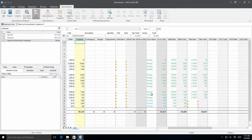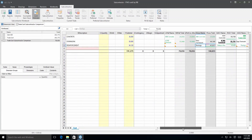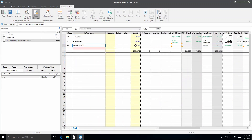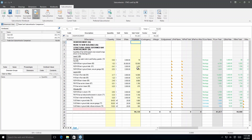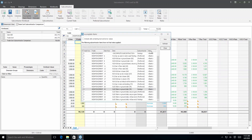An incomplete item check can now be performed to verify if anything is missing. To show this, we can drill down to level 2 of the reinforcement trade and here we have pre-entered some items for the subcontractors. However, the second subcontractor's fabric items have been left blank. We can see these missing cells all have an orange tag in the corner indicating a missing price. Now if we click on the incomplete item check button, the window will open with a list of incomplete items. Double clicking on each of these will outline the corresponding cell in the worksheet. Now we can close the window and enter the prices for those missing items.